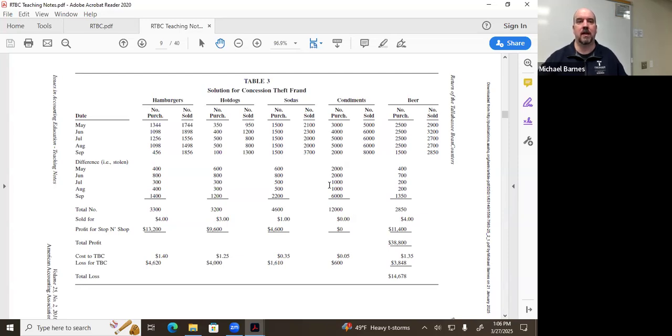So is the amount that the company bid, was that equal to the amount that they received for construction, or they were going to receive for construction? No. So did they receive more or less than what they bid? More, okay. They were issuing change orders on construction for items that were listed out at one price, and they said, we can't actually afford to do it at this price for certain specific reasons, and we're actually going to need to charge more for this. So even though they got the lowest bid, the eventual amount they received was much greater than what they bid.